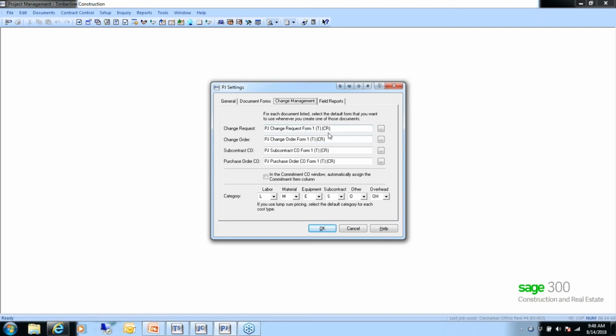Allow limited entry of contract amounts in worksheets in project management. So if you're doing any quick bill type jobs that have to have the contract amount entered through a miscellaneous worksheet, you will check this. Otherwise, leave it unchecked, and they'll be able to do miscellaneous worksheets inside project management.